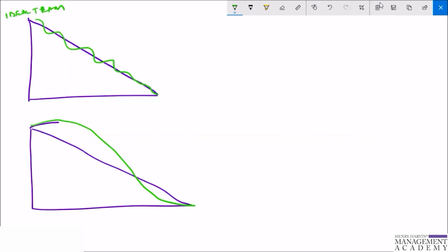The team has committed the work on time and met the sprint goal, which clearly shows the team started on the very first day and finished the work. They have finished the goal. They also have applied the principle of getting things done. But the most important thing is that they have adapted the scope of the sprint backlog to complete the sprint. So there is a little increase in the scope and they have adapted to it.